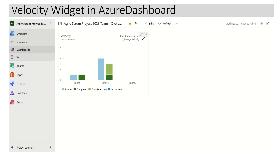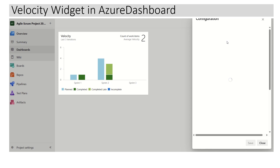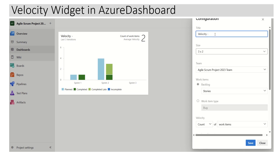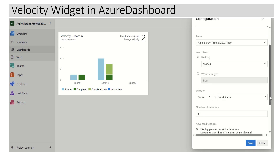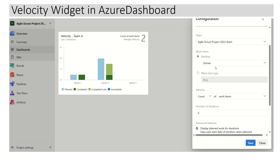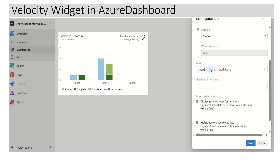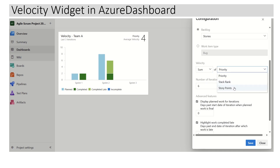It is showing data based on the count of work items, but we want our velocity based on story points. So we have to click on the three dots and click on Configure. Here we can see the title — let's say this velocity is for Team A. We can also enlarge or shorten the size of the velocity chart using the dropdown. Right now I'm using the default which is 3 by 2. This chart is currently using Stories as the primary work item for velocity calculation. We can change it from count to Sum of Story Points.